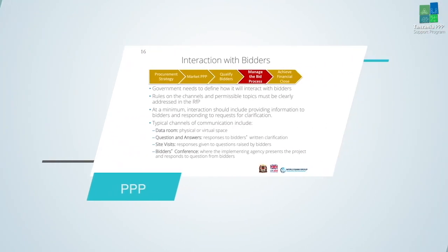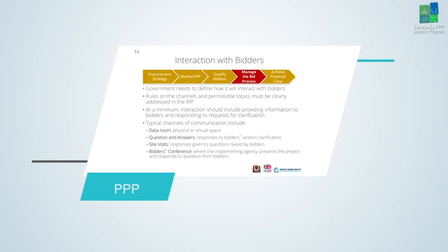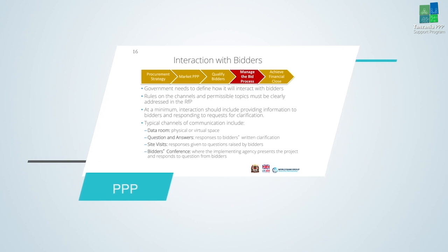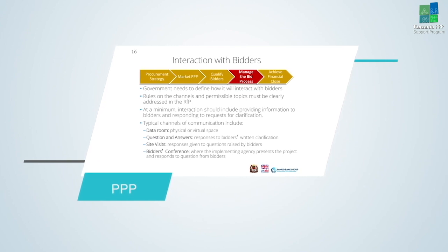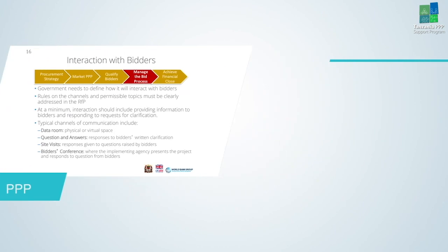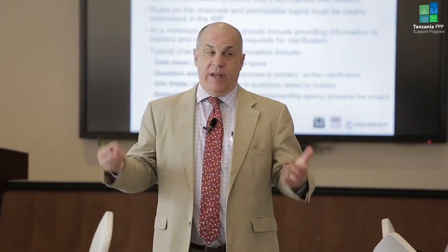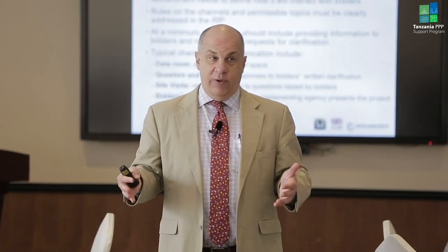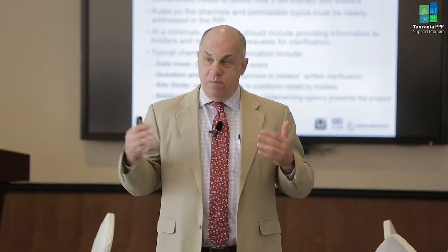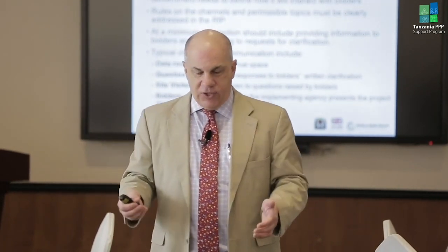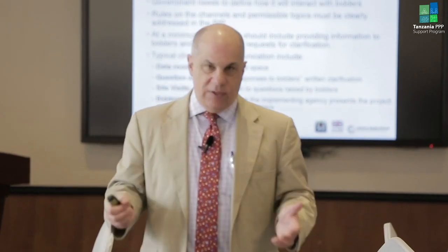There are just some other things in terms of communicating with potential bidders. There's the phrase, the data room. Remember, you did all this feasibility work yesterday when we went through the second module. The data room oftentimes will include your feasibility reports. You don't guarantee any of the information in there. It's up to them to verify independently.